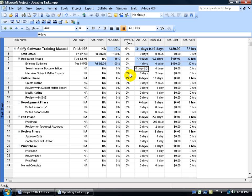And again, you want to make sure that you set that baseline. If you haven't set it before you begin entering your actuals, well, then it's too late. So you want to make sure that you watch my setting the baseline training video.